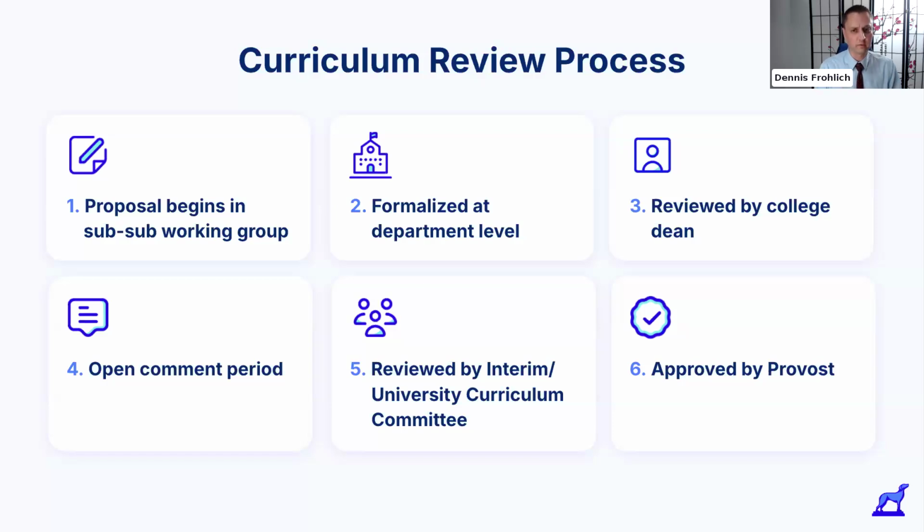Those proposals were formalized and then they were reviewed by the college dean. Now, at the time, we had 5 colleges, and so proposals would go there, and that stage took a while for proposals to get through, sometimes months, because there were so many programs submitting proposals at basically the same time. Deans are trying to get to know their new colleagues, their new programs, etc. And so that stage took quite a while. It ended up being sort of a bottleneck in our initial process.